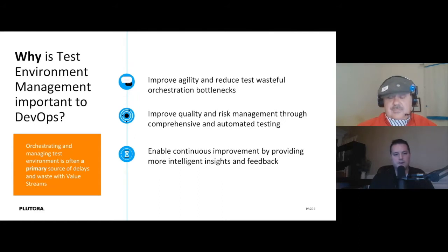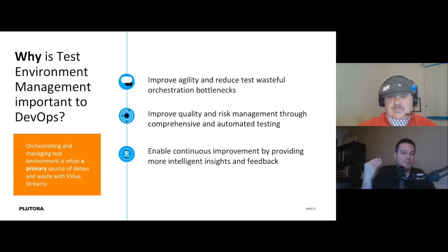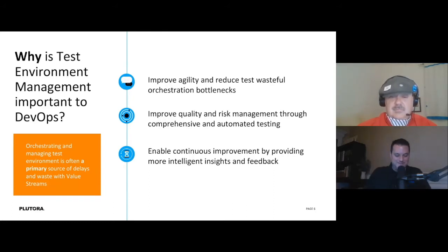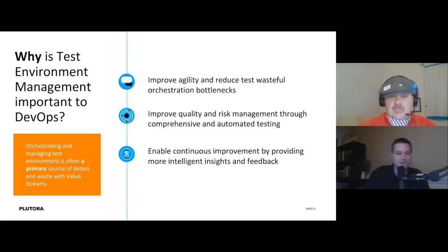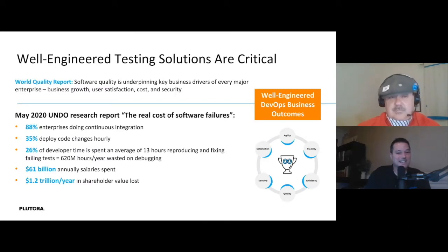You can do all this automation, get deployments out there, and then get stuck. One prospect I met with said they provision brand new hardware for every environment they need and that process takes about four months — so you better know four months in advance when you need a new environment.